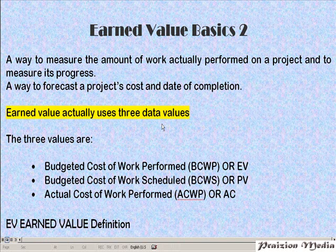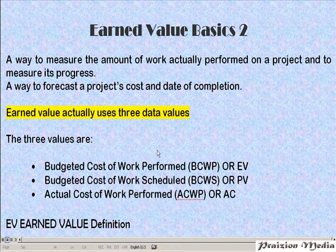Earned Value uses three data values. These data values are: the budgeted cost of work performed, which is Earned Value itself — EV; the budgeted cost of work scheduled — BCWS, or PV; and the actual cost of work performed — ACWP, or AC.